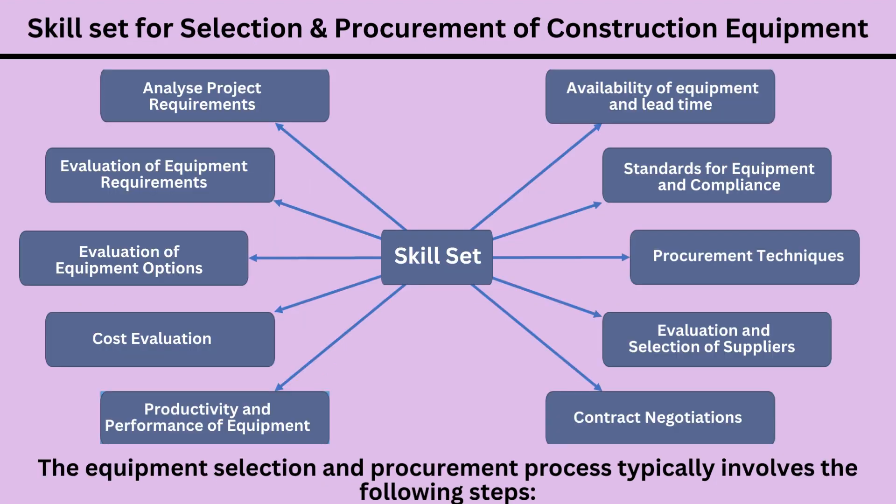The equipment selection and procurement process typically involves the following steps: A. Analyze project requirements. B. Evaluation of equipment requirements. C. Evaluation of equipment options. D. Cost evaluation. E. Productivity and performance of equipment. F. Availability of equipment and lead time. G. Standards for equipment and compliance. H. Procurement techniques. I. Evaluation and selection of suppliers. J. Contract negotiations.